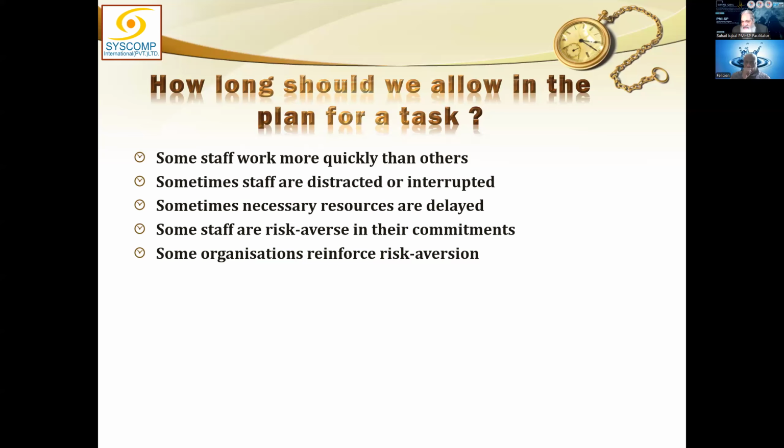Why I'm saying just in time delivery is because you could have ordered those things earlier and stored them 3 months earlier. But that doesn't mean that is beneficial because if you store items, it will cost money. You have to maintain them, you have to secure them, and it will cost you extra.